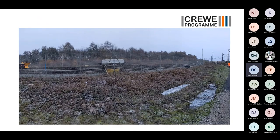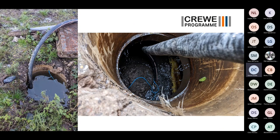Would anyone like to guess what's hiding under the ground in this area? Any telltale signs? Water. Some water. There's definitely water. Yeah, no, there's an interceptor. That 2010 scheme that we were talking about, we didn't realise that they'd put an interceptor in. So Siemens came along and wanted to put an REB in, and then they dug down and we discovered there was an interceptor straight underneath where they wanted to put the REB. Oh, that's a different problem.